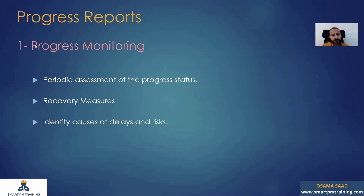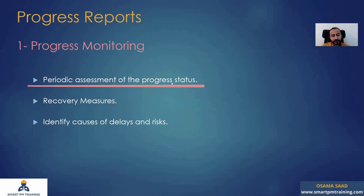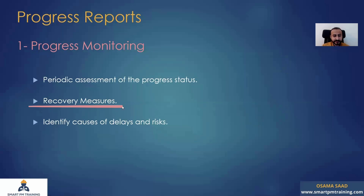Let's go one by one. Progress monitoring is a periodic assessment of the progress status — how you are performing over time in the project. It doesn't make sense to wait until the project end to see where you are. You need some alarms, you need to see where you are going, because it will help you develop recovery actions and take the recovery plan as well. For recovery measures, it is not enough to report that you are in delay, but how you act on it.